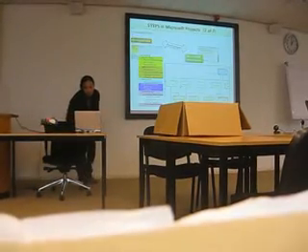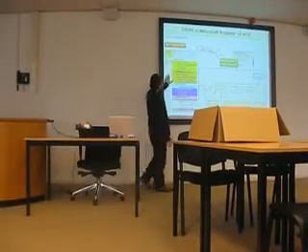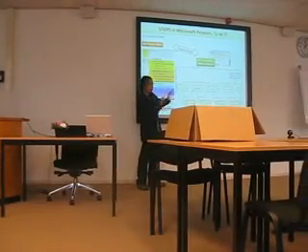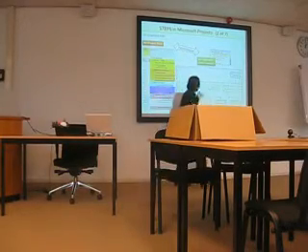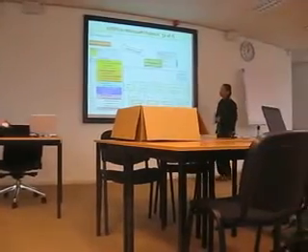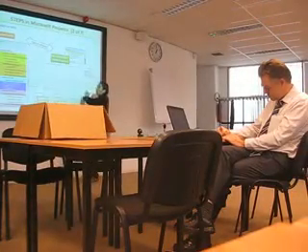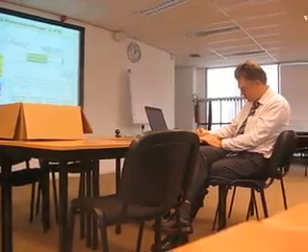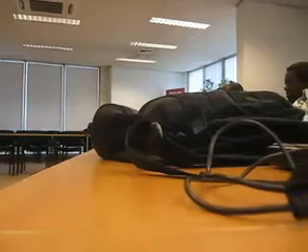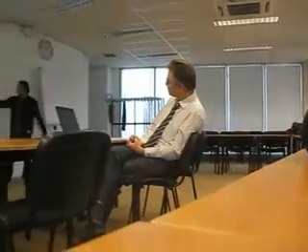Okay, after that, the second one is the graphical WBS. Microsoft Project can provide the code, but Microsoft Project cannot provide the graphical WBS. That's why we use another application, Microsoft Visio 2007, with a modular WBS. We just export and import. You get the WBS code and import it into Microsoft Visio 2007. Just use the menu from here, and it will automatically draw the graph like this.